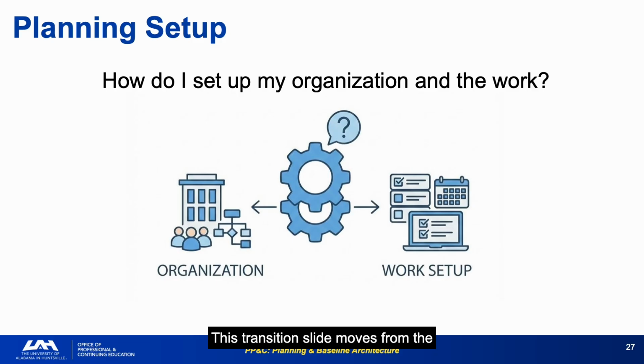This transition slide moves from the planning process overview to the first structural planning tool, establishing how the project is organized and how the work will be decomposed and assigned. The OBS and WBS must be set up correctly from the beginning. Fixing them after the fact is expensive and disruptive. It changes control accounts, reassigns work, and breaks schedule logic.